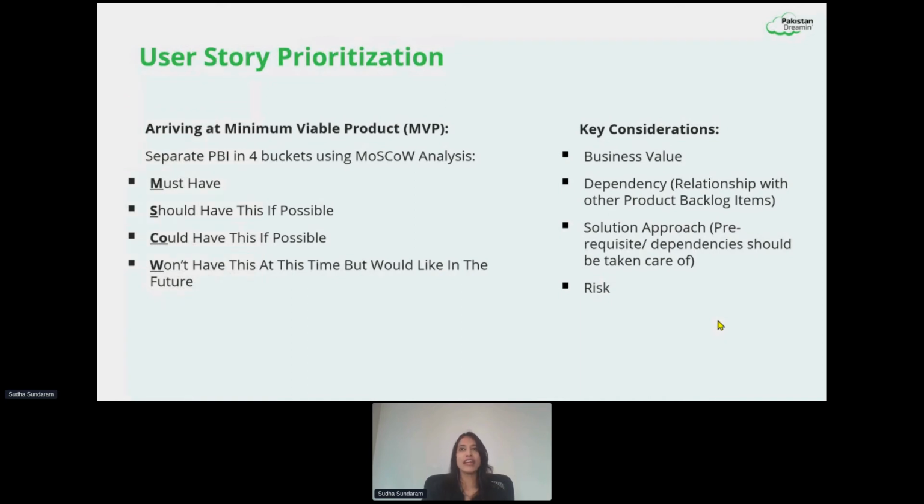While we were discussing all this, we realized that case management was one of the topmost priorities for the business, because that was giving them more business value. A lot of people call the call center, so it's very important to ensure that they have a process set. Say, for example, that became my first priority item. Then we do have something around FAQs or knowledge articles. So that becomes my second. We wanted to build some Slack channels so they can collaborate. That became my third. So we have these priorities.